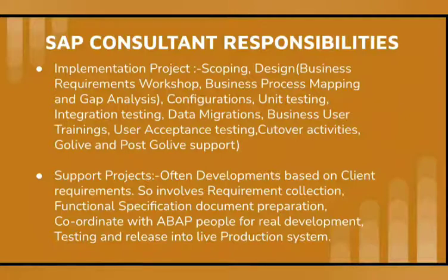So unit testing does not cover the role authorization testing activities. Integration testing covers the role authorization activities. In integration testing, we need to assign the actual roles created by the security people. Those roles will be assigned to the test users, and we will test the same in the integration testing phase.